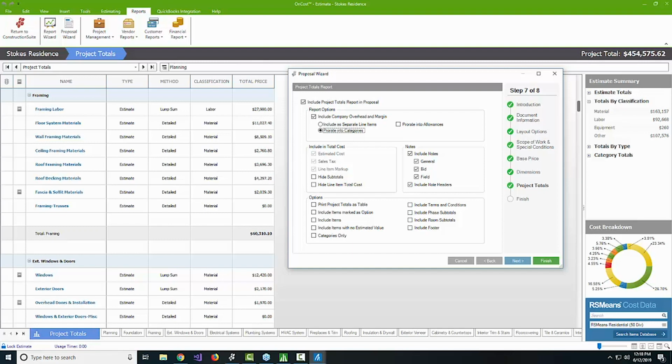That's right. And again, the other option here for prorating, we can have it separated out. If you're working on cost plus projects, of course, sometimes it helps. Prorating, for me, that's the standard for fixed fee contracts. If you're ever putting in a specific dollar amount, like in this case, $450,000 for the contract amount, if that's not going to change, that's just what we're putting in there. If it doesn't meet the customer's budget, we can talk about what we need to remove at a later date.